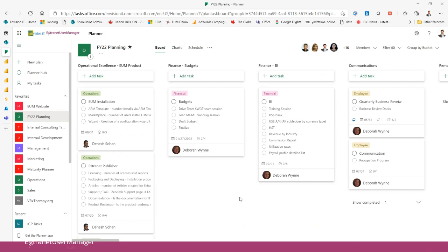It's all in Planner, but honestly, it's a little overwhelming to look at it in Planner. We started by defining buckets for the 4 quadrants and then putting tasks down from there. That got to be a little much because there are so many tasks when you start to look at it across all of that. Then we said, okay, well, let's break some of those tasks into buckets that are initiatives, and we kind of had a mixed bag. Some of the buckets were quadrants and some of the buckets were initiatives. We said, hey, that's not working well for us. Why don't we standardize and say, you know what, let's just make the buckets initiatives, and that's the only thing that they represent.